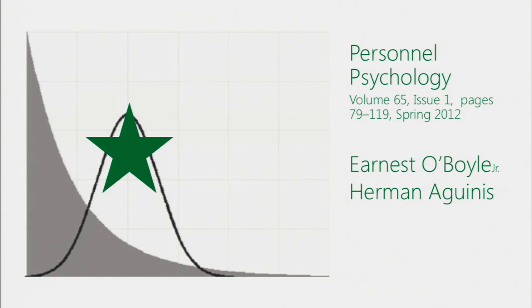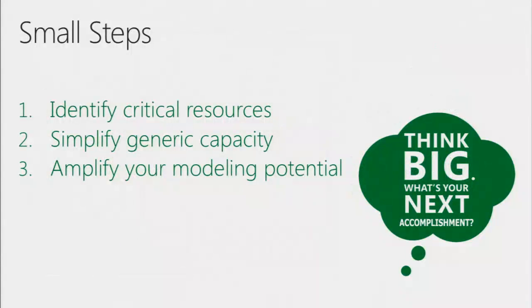So wouldn't it make more sense, in our resource capacity model, to separate those people out? Identify them as resources. Opportunity. If we decouple from that enterprise resource pool, we can build a model that works for us, for future planning. And we can control all of the little inputs. And we can take the information we need from the enterprise resource pool in our model in a number of ways. We could create stubs for those projects in our proposal list. We can discount their availability in our capacity model. So there's a number of ways to get around that.